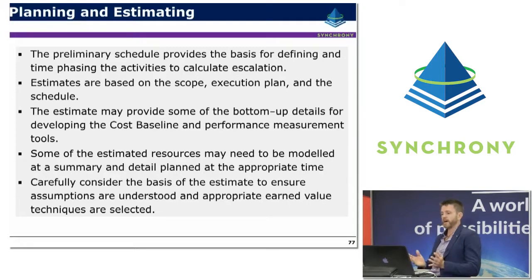It's really important to consider the basis of estimate to ensure that the assumptions are understood and appropriate, and the appropriate earned value techniques are selected. So in terms of developing a performance measurement baseline, you should have a basis of schedule that is associated with that performance measurement baseline. And if you're incorporating an estimate and you notice that some of the assumptions that were included in the basis of estimate have changed or have evolved for some reason, it's really important that you capture the resource requirements and that you document the basis for your performance measurement baseline in your PMB, particularly identifying any areas where it's deviated from your estimate.